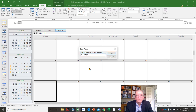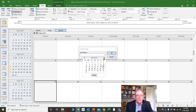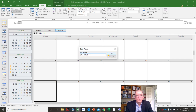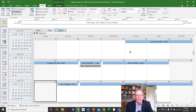So if I'm doing a three-week look-ahead, I could filter the information and print it off — this is what's coming up. I can have my discussions with the various trades on that. On a larger project it would be more complex, but regardless we can customize how we show and filter this information.